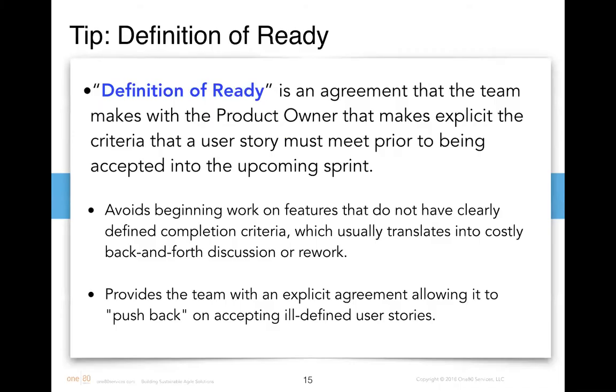All right. Now, the first tip that I would like to give, because user stories are very complex and very difficult to write, since this is a short webinar, is I would always consider writing a definition of ready. A definition of ready is an agreement between the product owner and the team that says the product owner will provide his user story or requirement in a certain level of detail before the team will consider working on it.